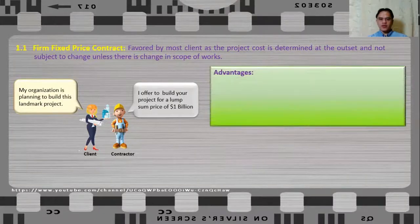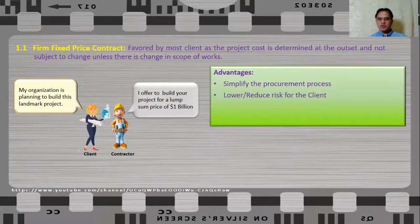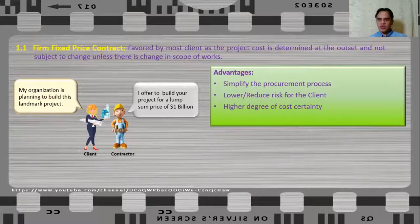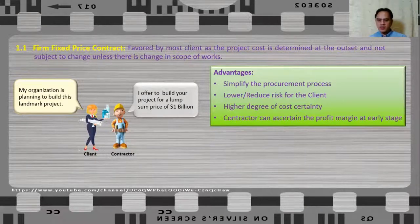The advantages of firm fixed price contract are: first, it simplifies the procurement process; it also lowers or reduces the risk of the client; and there is a higher degree of cost certainty because the client already knows the total project cost at the outset. Also, the contractor can ascertain the profit margin at the early stage, provided the contractor will complete the project as planned.